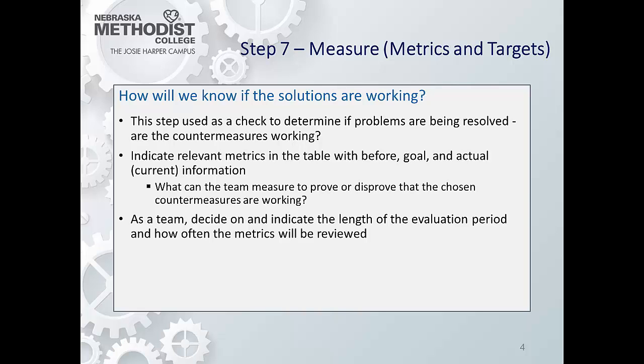If the improvements are not having the desired impact, you must go back to step 4 of the A3 process and dig a little deeper to ensure you have found the true root cause of the problem, essentially starting the PDSA cycle over again. If the improvements are having the desired impact, you can move on to the final step of the A3 process, standardize.